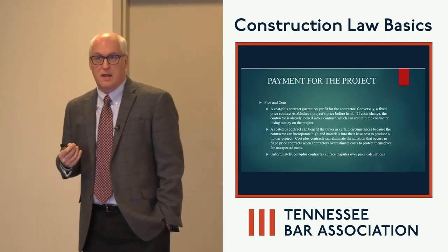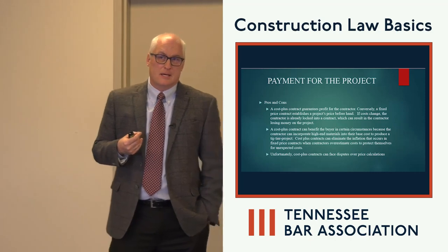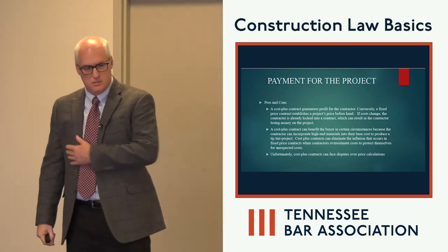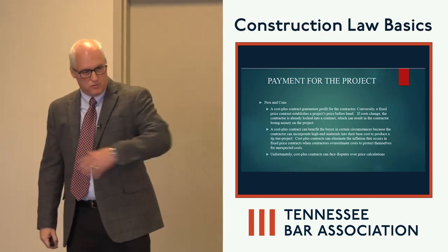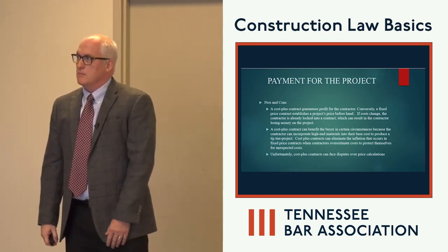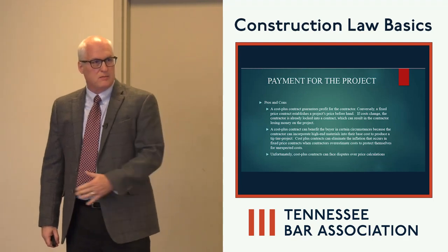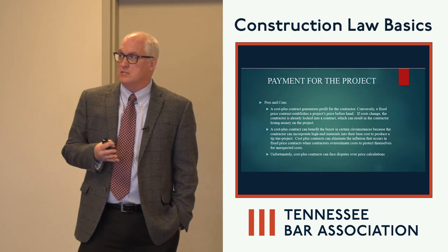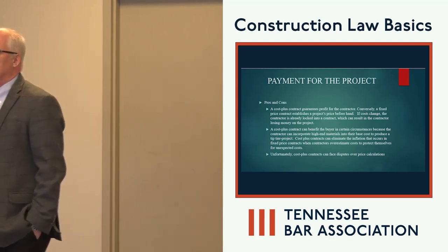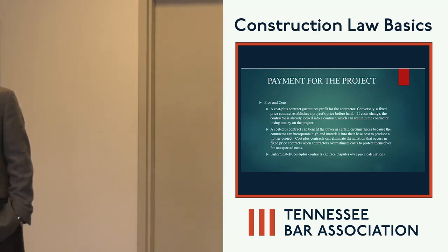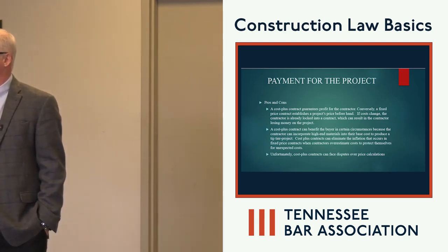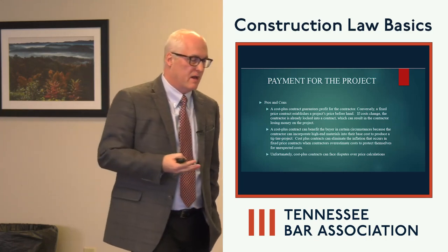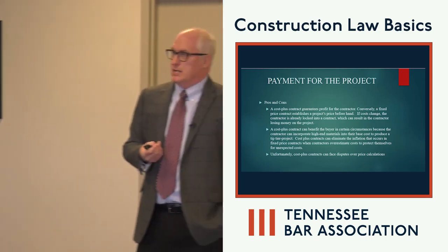On a spec house, they'll go in and buy 5 lots in the neighborhood. They'll put the footers down, the framing crew will come in, and they'll just go right down the line and construct 5 houses. They'll do it for a set price for each house. They know ahead of time what their margins are, what the fixed price is. They know from experience that they're going to make a certain amount of money on each project.